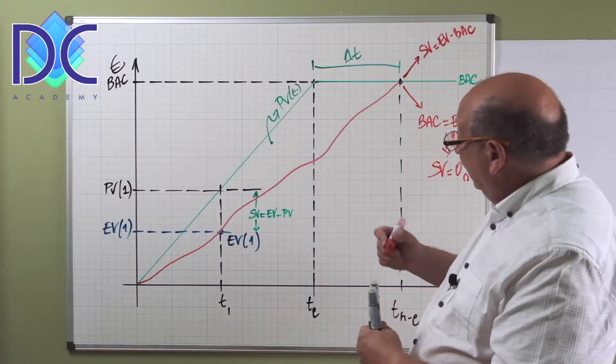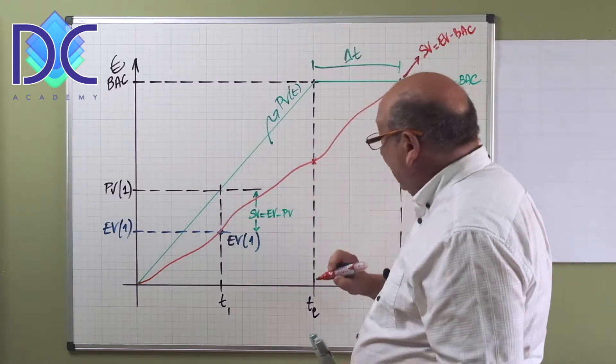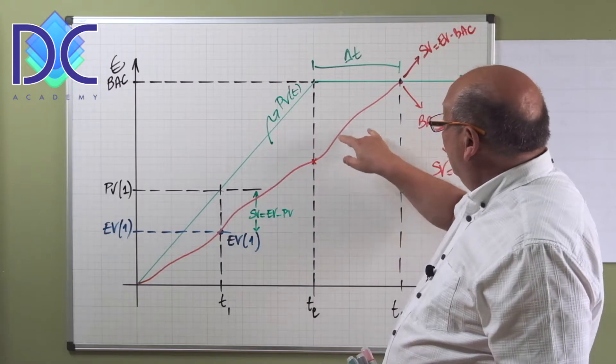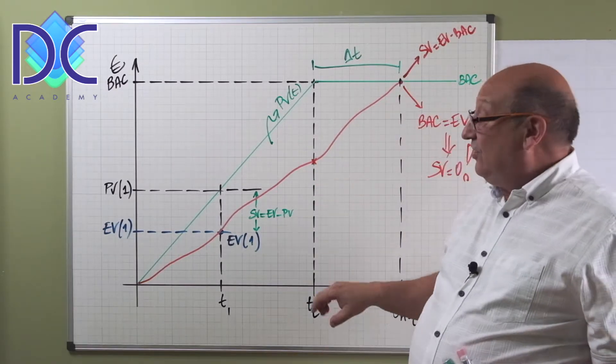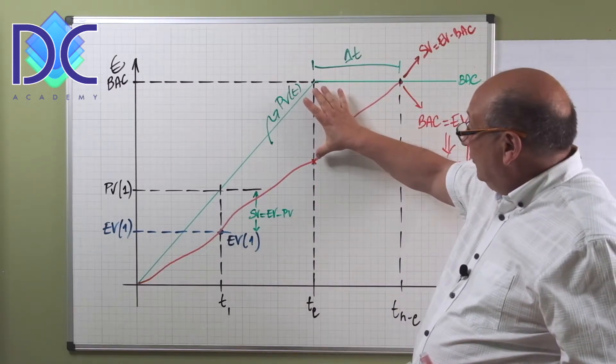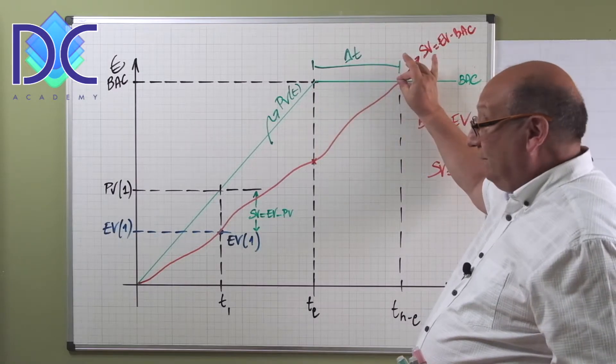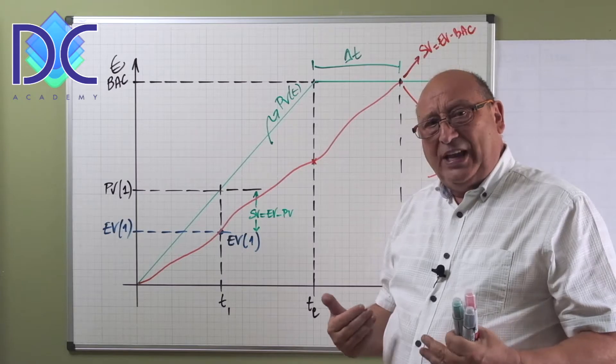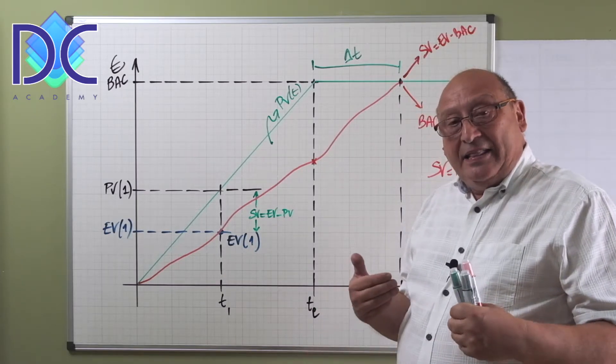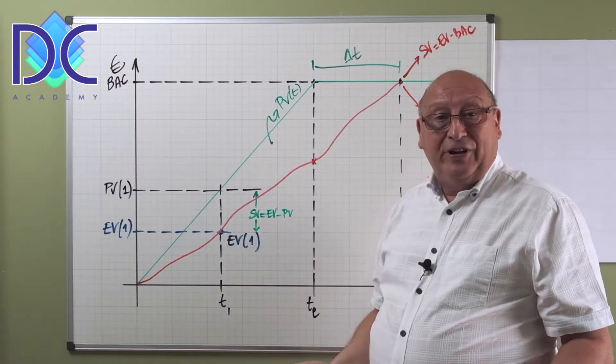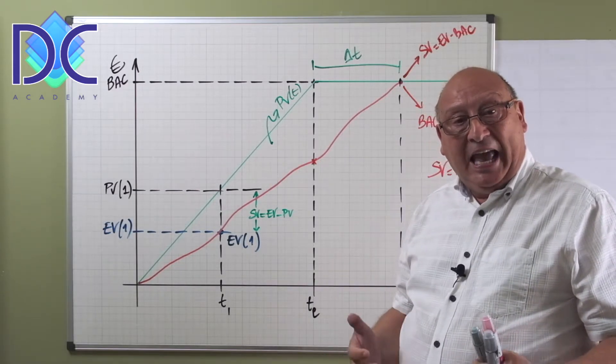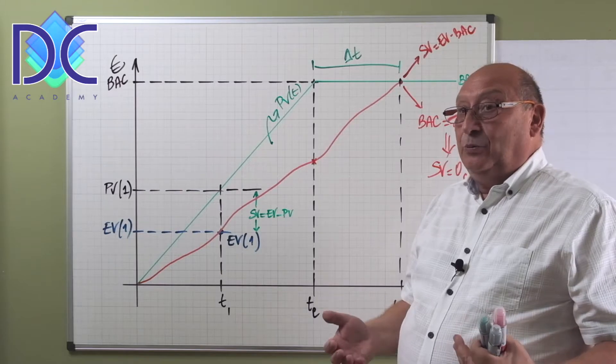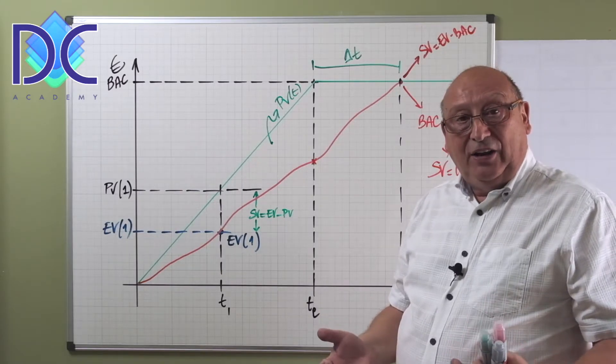This would mean that we are on time, but when we look at the time scale I see here a delta t, so I'm basically late. It's not correct, but my schedule variance is zero. Now what happens the moment that I arrive here at the expected duration of the project? Even when the time difference is still increasing, the schedule variance is decreasing to reach zero.